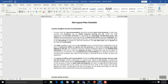Together with accommodation, you may need a canteen, but since this is a ten-story building it is not a large-scale project, so mostly you need a dining area. Another important thing is stores. For offices, you can build them using containers as a two-story office complex — one storey for the main contractor, another for the engineer — or a single-storey arrangement. The same applies to accommodation.